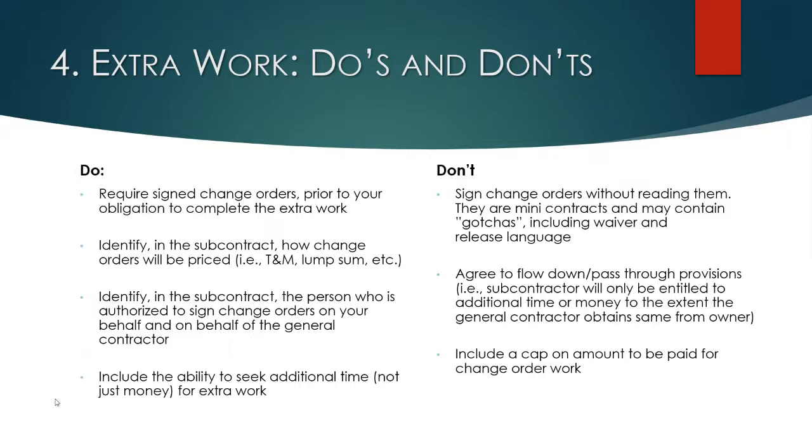Last slide here on extra work, do's and don'ts. Best practice requires signed change orders prior to performing your extra work. That's the best practice. I realize that it doesn't always work that way in the field. Things get hurried and rushed, and we'll get a signed change order later. Do your best to get the change order signed by both parties. Follow the subcontract provisions on what's required there to avoid any disputes down the road.